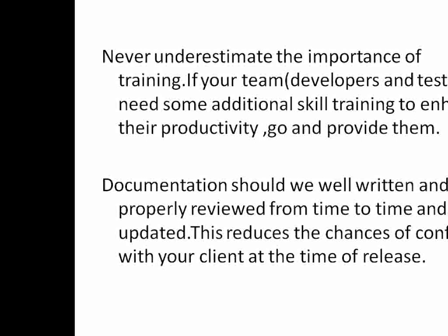Never underestimate the importance of training. See, to save some dollars, I will not go for the training. This is a bad scenario. If my team members, which can be developers or testers, need some additional skill training to enhance their productivity, go and provide it. Because see, if I can invest $100 in the training, they can do their work in a much faster way. They can save, say, 10 days. 10 days saved is like $10,000 saved for the client. So it's a win-win situation.